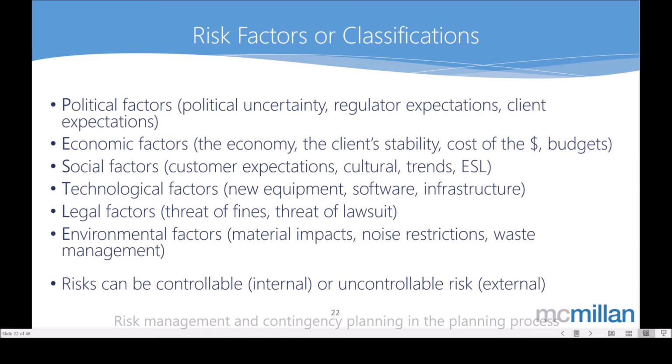And usually, when we think about risk factors, one of the really good tools is to think about PESTLE as another acronym, surprise, surprise. And PESTLE can help us to classify different categories of risk. So, it helps us to structure our thinking a little bit when we're breaking down potential risks in what we're doing. So, as part of our plan, we may need to think about things such as political factors, uncertainty, or regulatory or legislative impacts or risks associated with what we're doing.